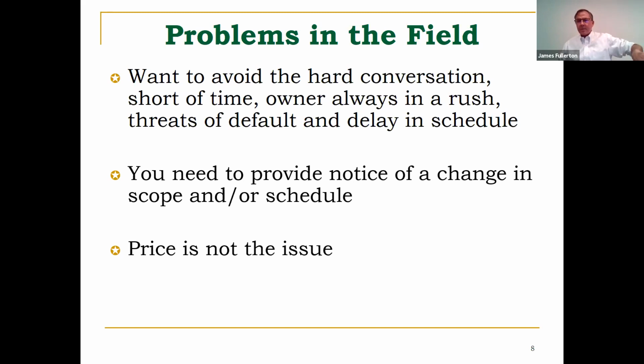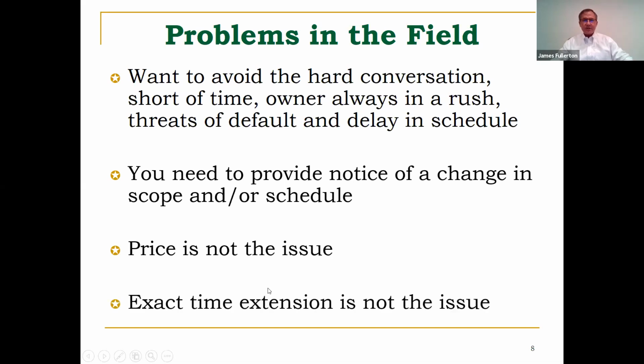Price is not the issue. Even the exact time impact is not the issue. You need to make it clear that this will cost extra money. This will delay the project. We will let you know the exact impact as soon as we are able. And you do need to do that as soon as you are able, but you don't necessarily have to do it in the initial notice. That varies from situation to situation.